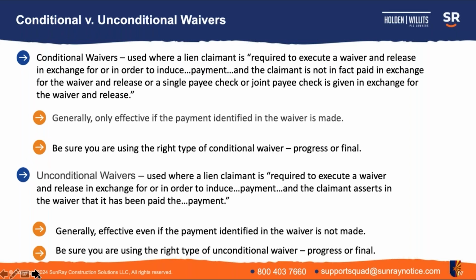Conditional versus unconditional waivers. This is another dichotomy that exists in the statutory forms and lien waivers in Arizona. Conditional waivers are used, as the name implies, when a claimant is required to execute a waiver and release in exchange for, in order to induce payment, and the claimant is not in fact paid in exchange for the waiver and release, or a single paid check or joint paid check is given in exchange for the waiver or release.